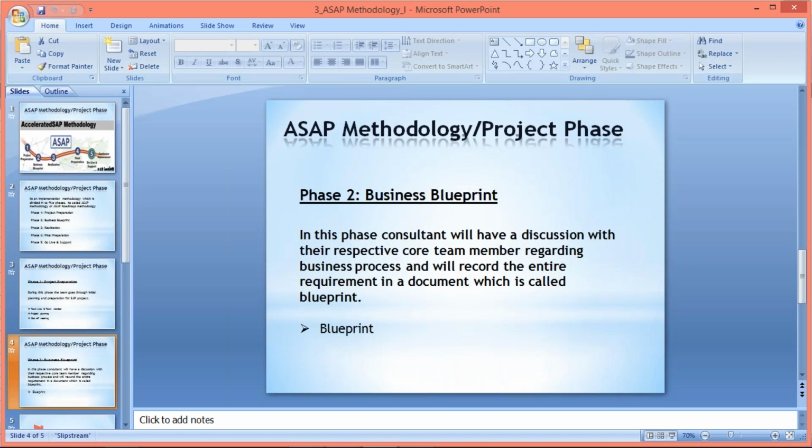If I say, for some projects the implementation is already done, still it is running, still the client is not satisfied. Why? Because the earlier project manager, due to certain reasons, quit or left in the middle itself. Now the client is saying that he committed this, he committed that, and so on, right? But there is no such document. So in that case, the client will always be right. We cannot say that you are telling a lie, because the fault is from our side, since they failed to document all these things, let's suppose the project manager left, or whatever the issues are.